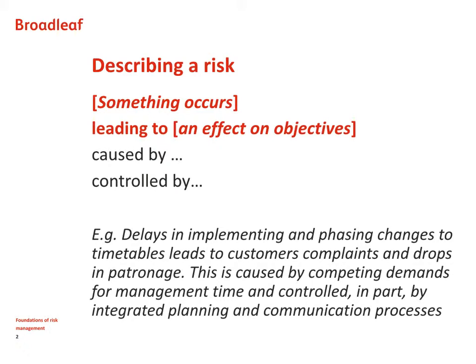Here's an example. Delays in implementing and phasing changes to timetables leads to customer complaints and drops in patronage. This risk is for a public transport operator. This is caused by competing demands for management time and controlled in part by integrated planning and communication processes. As you will see, that's a fairly full description.